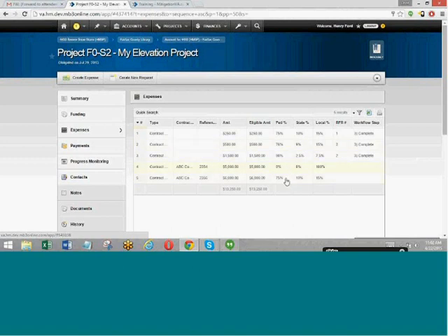This is an indication that these expenses are unlinked expenses. What we mean by unlinked is that they're not tied to a reimbursement request, which will result in a payment. They're just expenses that have been logged against this project. You've uploaded their documentation, etc., but you're not actually requesting a reimbursement at this time. You're just tracking your expenses throughout the life of the project.